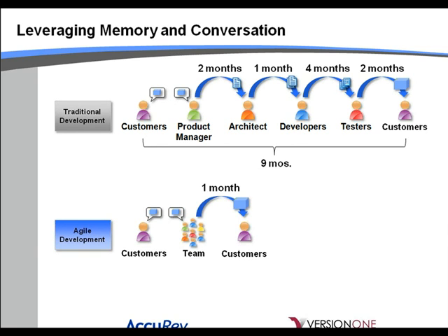Now, a little bit more about this team. If you have a very large team, you may break that down to several Agile teams. Within a team, they're going to be assigned a project or a list of work, and that team needs to have everybody on it that's necessary to get that work done. So a QA person in that team, if you need a DBA, then a DBA in that team. In some cases, it may not be realistic. Maybe you have 2 teams and 1 DBA, and they both need a DBA, so it's going to be shared. But Agile says avoid sharing.